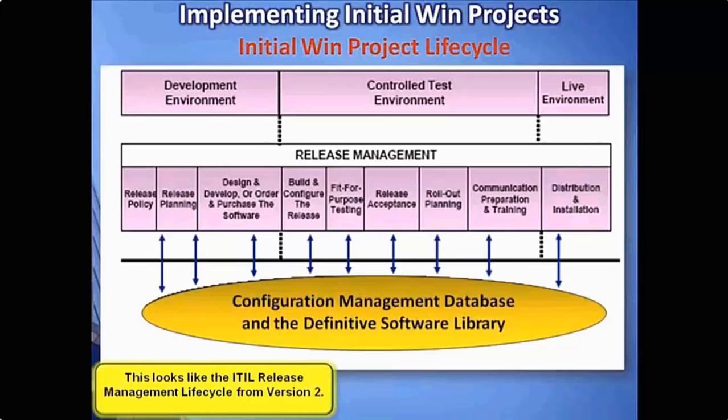In addition, if you have multiple initial win efforts that are going on all at the same time, you may want to consider not deploying these individually, but maybe packaging these together in a release-like fashion to minimize disruption to the business and the organizations as these solutions are being put into place. Again, you're bootstrapping and stealing a little bit from that ITIL release management process to help make this work.